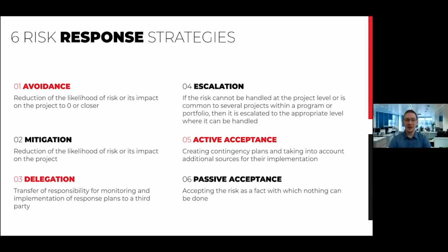After identification and analysis of each particular risk, we should decide on how to respond to it. And here we have 6 strategies. The first and the best is the avoidance. This strategy allows us to completely reduce the risk probability or impact. Unfortunately, there are not a lot of cases where we may use this strategy.